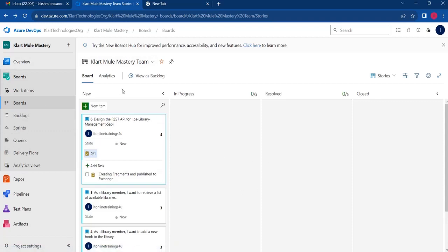But as of now, just remember, you will be having one tool. It might be Jira, or it might be Azure DevOps, or it might be anything. But you will be tracking your work somewhere. If you are following agile methodology, you should be working on different sprints. You should have multiple user stories assigned. You need to track these user stories every day, by logging how many hours you are working on that particular task. Just remember these points as of now.